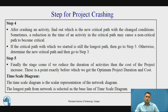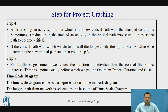Step 4: once crashing is determined, we go through multiple steps — select the activity, crash it, check total indirect cost, direct cost, and define the total project cost. We try to crash the project until the optimum duration and optimum cost are reached. When crashing is done, there may be an array of new critical path activities. Finally we reach the stage where we get the optimum cost and optimum duration. The time scale diagram is a scalar representation of the normal network diagram, and the longest path in the network is selected as the baseline.